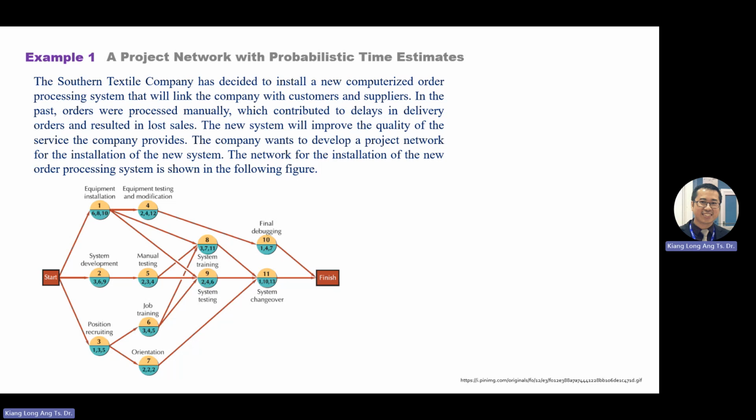Now yesterday we also learned how to find the critical path. There are two presentations. One is node to node. Another one is you change the node into rubrics. And there are four ways of finding the critical path. So the first one is the normal way, by path plus calculation. It means you identify how many paths there are, and you calculate the time or duration. Then you pick the longest time.